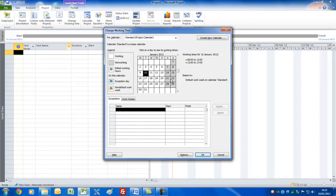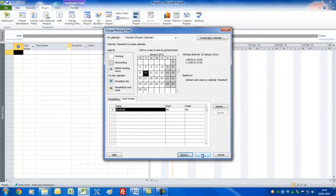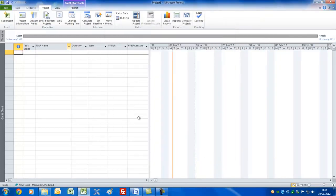The project doesn't work Saturdays and Sundays — that's the default setting. Under Exceptions you can put in particular dates, for example when your company might be closing down. Under Work Weeks you can change the hours worked per day. If you do change the hours, go back to Options and change the setting there too — you need to make this harmonize because it changes the way Project calculates.